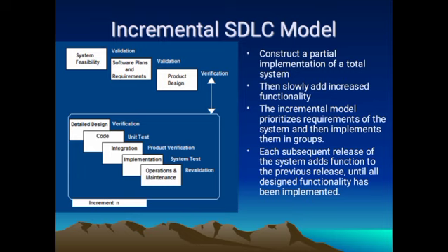Incremental SDLC model. Construct a partial implementation of a total system, then slowly add increased functionality. The incremental model prioritizes requirements of the system and then implements them in groups. Each subsequent release of the system adds function to the previous release until all designed functionality has been implemented.